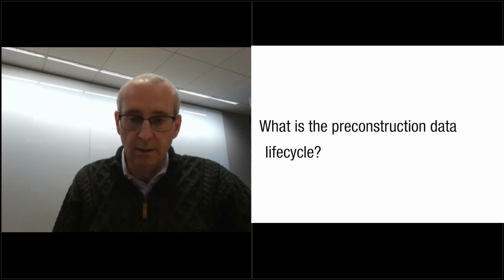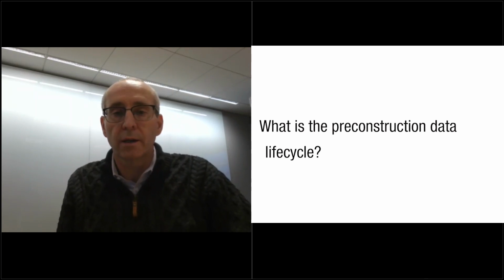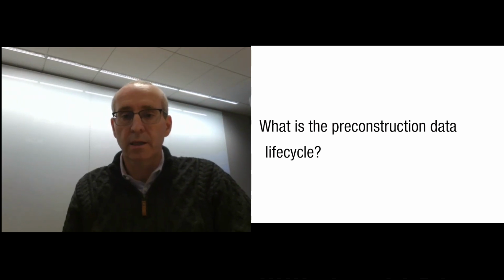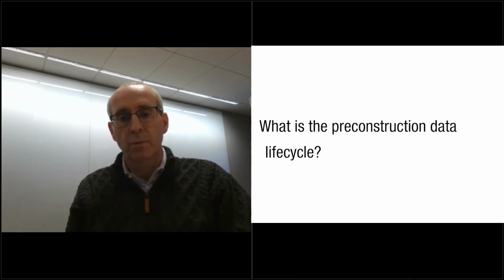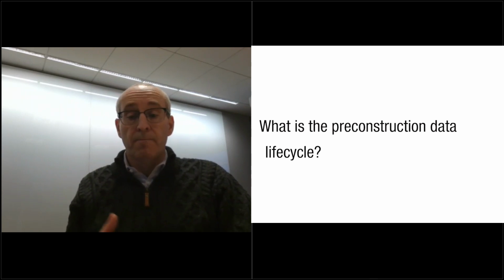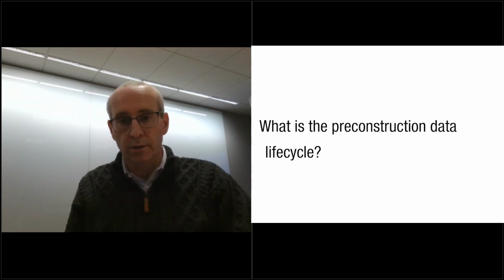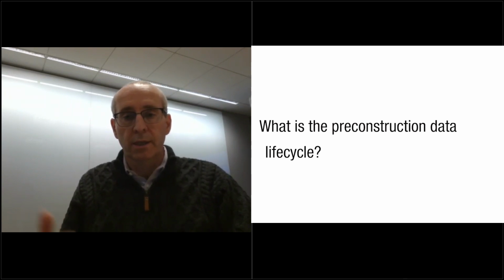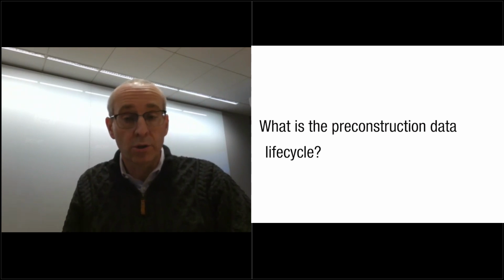So, pre-construction data lifecycle is a term or phrase that we use for describing the life cycle of the data that starts early in the conceptual phase of a project. And as the design develops, more and more data gets layered onto those original assumptions. At the end of pre-construction, once you've created a GMP, it gets moved into the construction phase and yet more data is added. And once the construction project is complete, we have a final bill of materials, a final construction